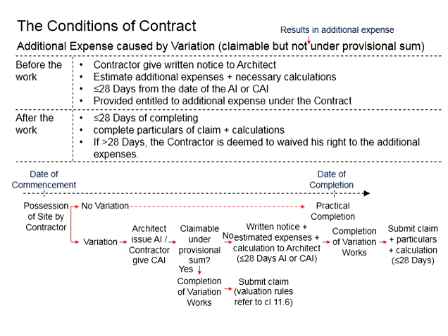With that, the contractor will have to make known to the architect and the employer the estimated expenses, seek consent from the employer before proceeding with the work, and then after completing the variation works, the employer will need to pay the contractors for the work done.